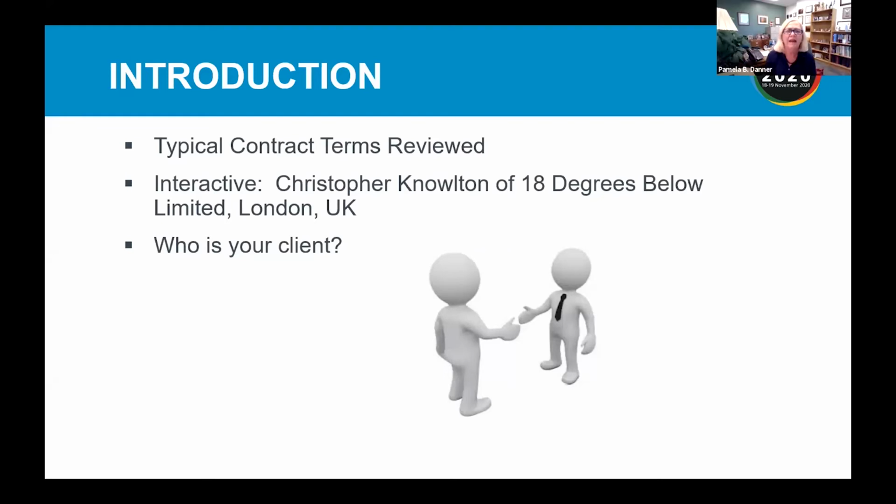So who is your client? And that's very important to know. And as you can see, it can be an architect, it can be an owner directly, as well as a general contractor. And that may also mean that you're either a prime contractor or a subcontractor to an architect. For the general contractor may be a prime to the owner, the architect a sub to the general, and the lighting designer a sub to the architect. So it puts you 2 tiers down.